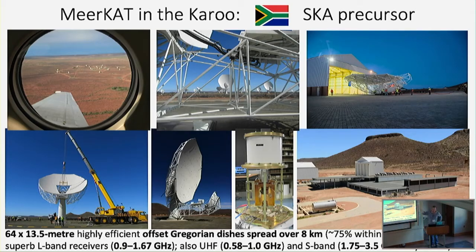And inside the dish shed, you could fit 3 antennas in various stages of production. So the individual panels, it's aluminium panels, are shipped to site, and all of the backing structure components are shipped to site. And then the assembly of that happens in this shed. And then the pedestals are also shipped to site, and the pedestals are mounted, so the pedestal is over there.